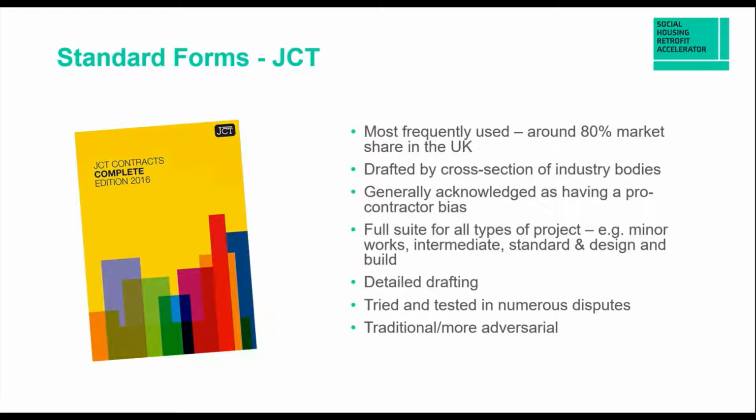It's drafted by a cross-section of industry bodies. So JCT stands for the Joint Contracts Tribunal. It has a full suite of contracts for all types of projects. So for example, it has the minor works, the intermediate, the standard, and the design and build, which we can look at on the next slide. But it also has major project forms, framework contracts, and management contracts.